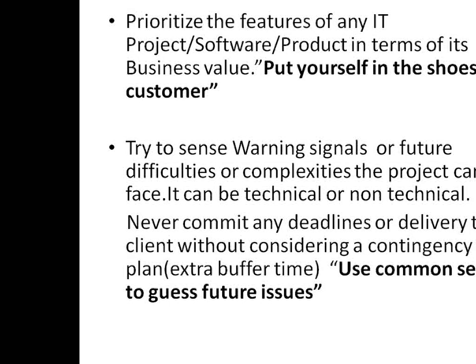Suppose I have 10 features. Feature number 1 has the most business value. It is like 80% of the value, and the rest 9 features hold 20% of the value. I can use the Pareto principle, the 80-20 rule, and I can concentrate my time and energy and focus first on feature number 1 because it holds the maximum business value. So always keep this thing in mind. Think from the customer's perspective.